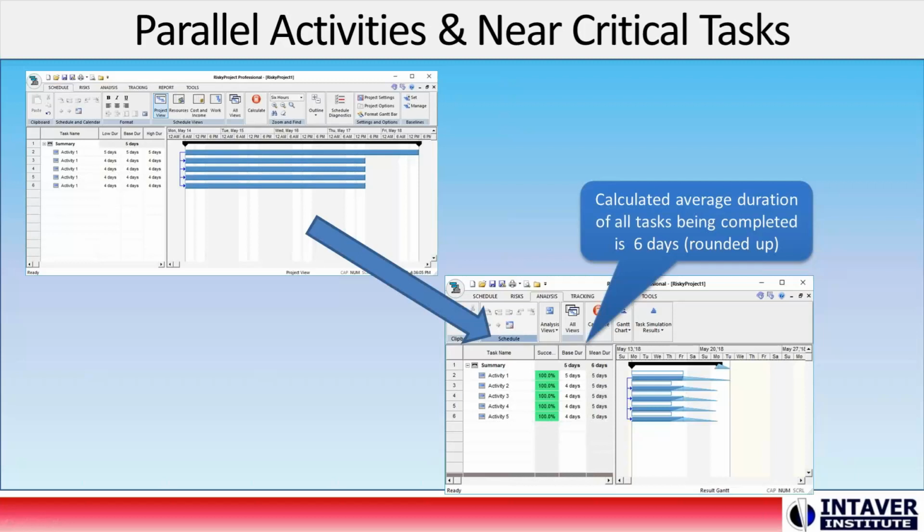And if we have large activities, there are going to be many in a large, detailed project schedule. You're going to find that there are lots of merge points that occur during the project schedule, and this effect starts to accumulate.